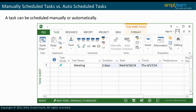We will discuss the difference between manually scheduled tasks and auto-scheduled tasks in this slide. A task can be scheduled manually or automatically. When you enter a new task, it is added as a manual task by default.